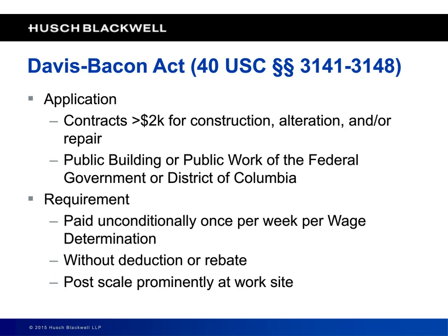Anyway, the City Center DC project involved a private development on the former site of the DC Civic Center. The District of Columbia government awarded a 99-year ground lease to a developer to build a private development, including retail and office buildings and a hotel, on the site of the former Civic Center. A carpenters union went to the DOL and said, hey, shouldn't this be subject to the Davis-Bacon Act? And eventually the Department of Labor agreed.